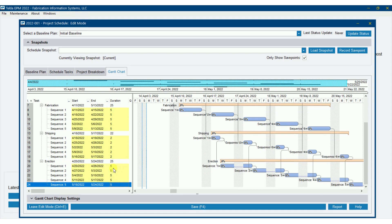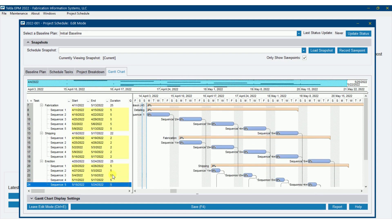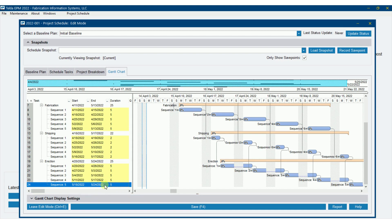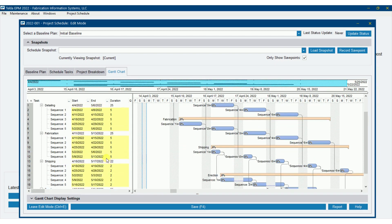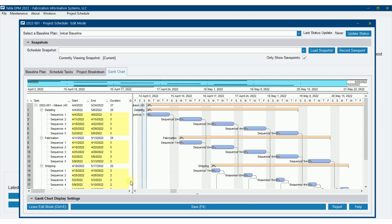And erection, we'll say it's five days as well. So based off of all of that, I've got a schedule set up which takes me out to May 24th on this particular project. So just by filling in your starting date with your links set up, then you can just put in the duration for each one of the tasks and then it will fill it on out for you.